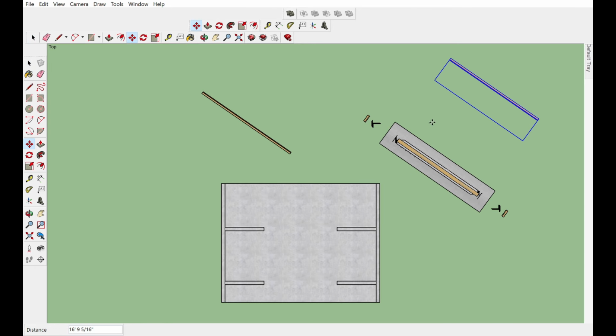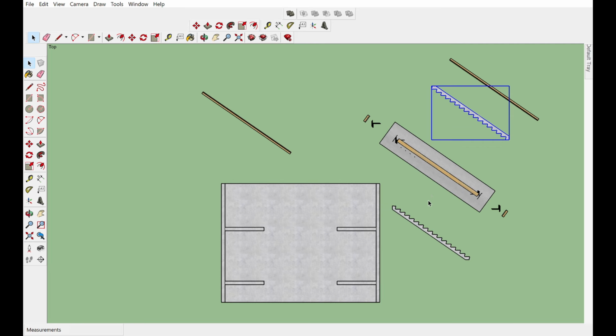Typical installation sequence. In normal site practice, the precast stairs are installed and connected to the floor formwork prior to placing the floor concrete. This allows workers to safely access upper floors before the floor slabs are poured.